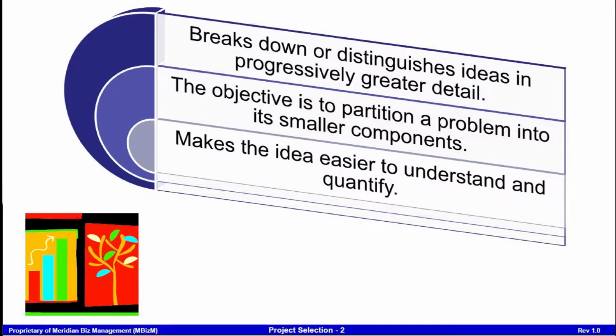Now once you have done the project charter, you have to justify that project charter with some relevant tools. For example, the next tool we'll be talking about in define phase is the drill down tree. For a large or complex project, you will have to break it down into a more manageable project, or you want to have the scope of the project worked out. So for whatever project you have identified, you need to break down the project using the drill down tree.